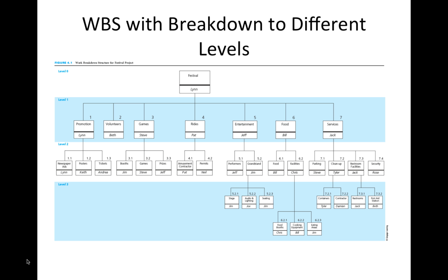Again, the work breakdown structure divides the project into smaller pieces called work items. The work breakdown structure should be decomposed into a level that identifies individual work packages for each specific deliverable listed in the project scope document. You should include the level at which a specific deliverable is produced as the output or end product of the work associated with a work package.